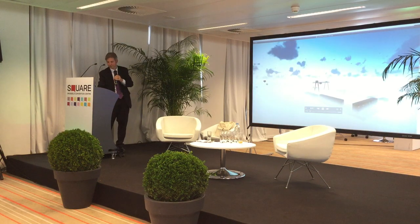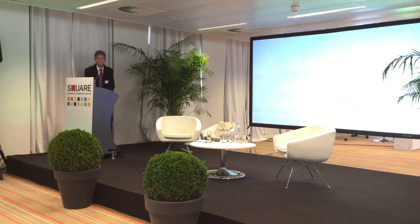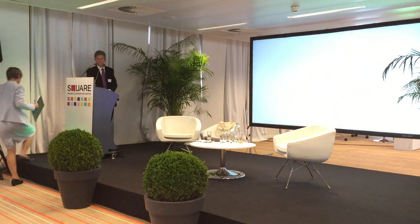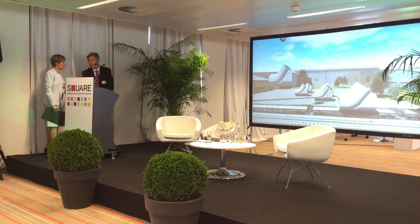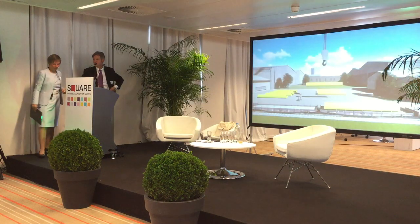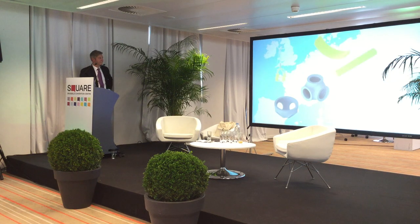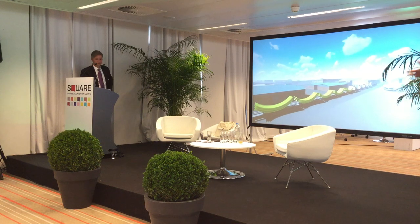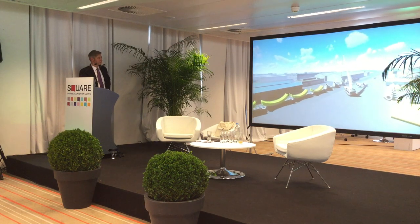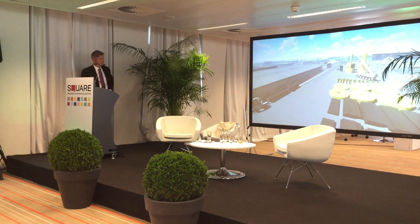Okay. So when we started the project, because the development has been ongoing for more than 10 years, we found that a very decentralized production for a serial production makes sense. Just imagine the car industry, where Volkswagen or Daimler or other companies get their parts from different prefabrication sites. That's what we are doing here, for example, in France, bringing these elements, which are designed to fit on the train, to the port, where we can assemble the structures.